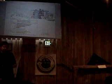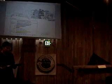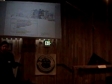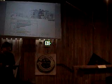The next step will be the stage 2 review, and the assessor will come out to the site. They'll do a walk. A lot of the stuff they will kind of put off to lock in those points after just seeing the site, seeing the building, reviewing it themselves. After they do the stage 2 review, there's still a chance to submit any other paperwork they're looking for, all the way up to occupancy. And I think even beyond occupancy, you can continue to work with the assessor to kind of lock in your final score.